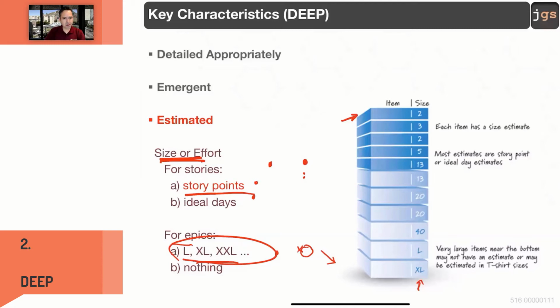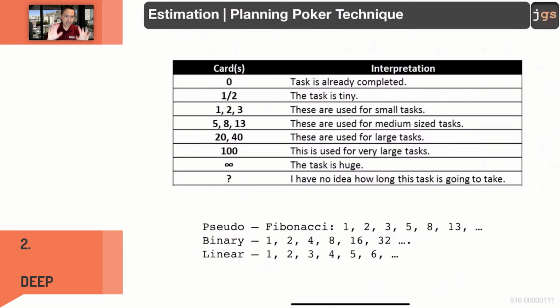Usually that is not possible because of two things. You do not have the experience or your team does not have the experience. Because think about it. You can have the experience, you can be able to estimate one day, but maybe your team is not able to provide an estimation in days. Your team is not aware of how to work with this Pac-Man thing and the graphics. If you or your team is not able to do estimation with time, that is the moment in which you move to story points. Story points, very simple.